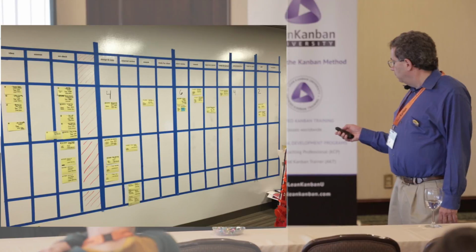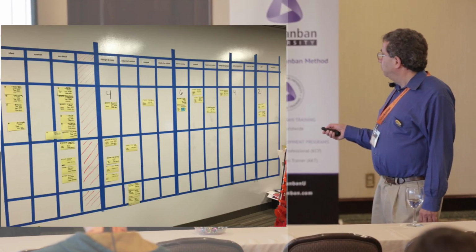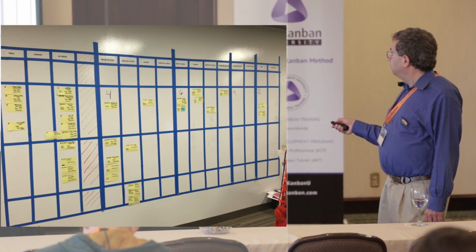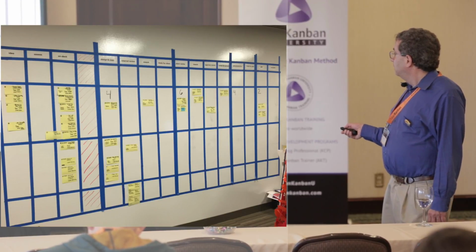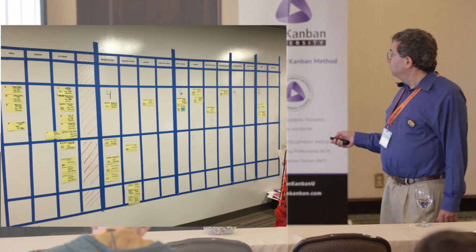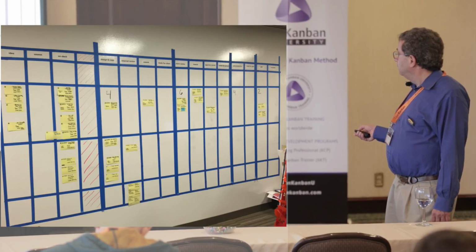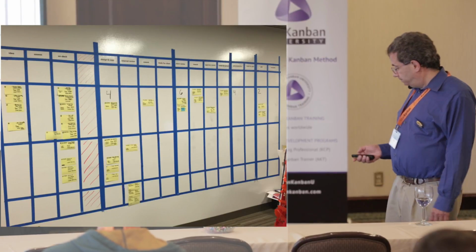So you can see that we're starting to introduce some WIP limits. The WIP limit over here applied to this whole group of columns. And that was basically, we had 4 designers, so it was 1 per designer. This was more our handoff to our clients, and these were pre-production steps down there.